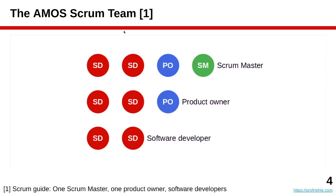In Scrum, which is our development method, student teams consist of nine students usually: six software developers, two product owners, and one Scrum Master. These are the three key roles of a Scrum team, the so-called committed roles. This is how Scrum teams are built and hopefully, if everything works well, this is a stable team over the course of the three months of an AMOS project.